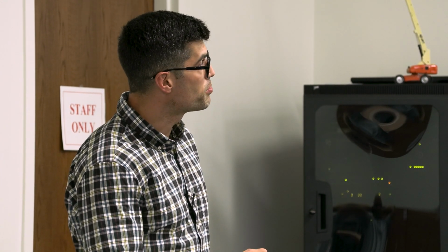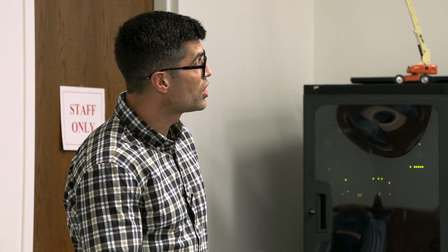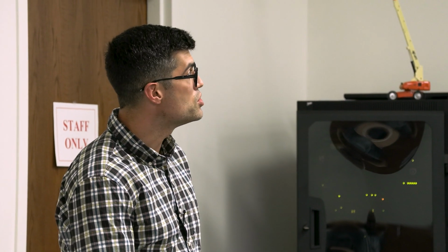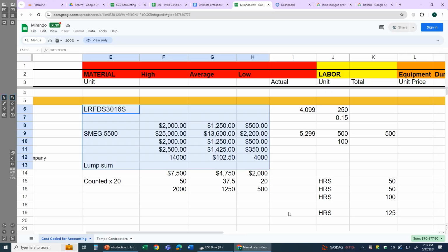So Tommy, you might want to present to that owner, hey, the stove you're looking at could cost up to 25 grand if you really want to go that high. The low you're looking at is about 2,200, and then we come up with an average cost. So if I'm basing it off a feasibility estimate, I put in ranges. Then in my total cost I'll just reflect the average, but it's documented and shown what the ranges are.